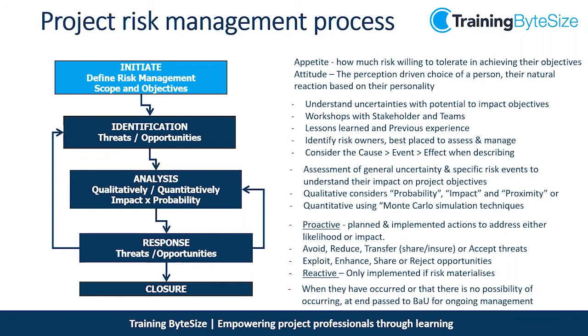Are there new risks? Have we analyzed the risks correctly? Now we've responded to them, has that moved them? Has that changed their impact and probability? Do we need to remeasure them? So we have to do this throughout our project. Risk doesn't just go away, it's constant. We have to be measuring it and keeping an eye on it throughout our project, right up until we hand it over to the customer.